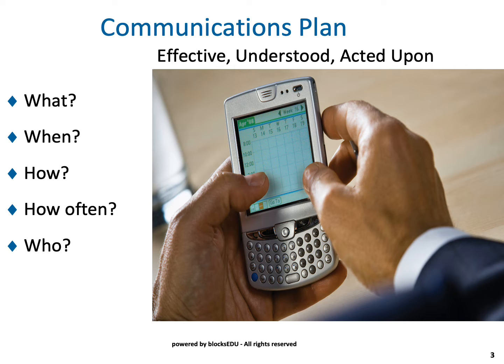Now, the question here is, how the heck do I figure this all out? Well, remember way back when we talked about stakeholder analysis, and I talked about having an interview with whoever your stakeholders are. What you do at that particular point in time is you ask these questions. We're going to have communications throughout our project. How would you like to? What would you like to see? When would you like to see it? What frequency? All those sorts of things. You ask that as part of that interview that you do way back with your stakeholders, and then implement that plan.